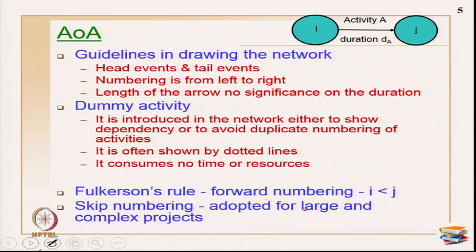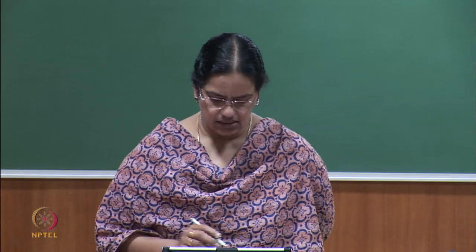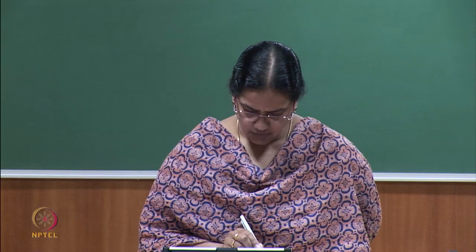Fulkerson's rule states that I always has a number less than J. Skip numbering is adapted for large, complex projects because changes and scope additions are unavoidable. If you number consecutively as 1, 2, 3, 4, 5, 6, adding activities requires renumbering. The general advice is to leave gaps and use numbering like 10, 20, 30, or 10, 15, 30, 50, so that activities can be added when the project scope changes.